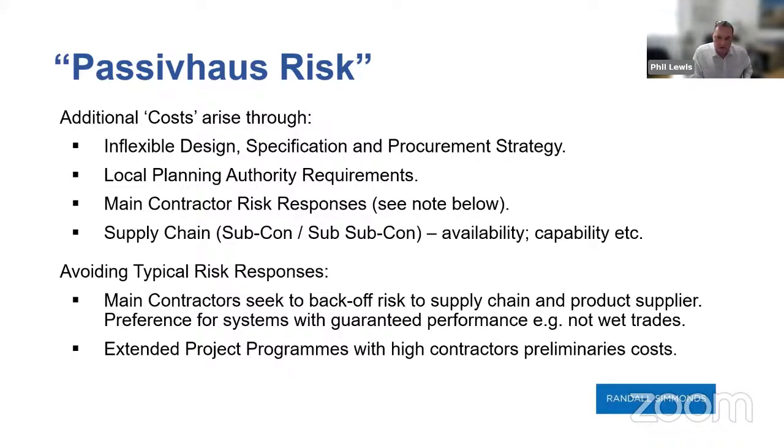Okay, and remembering on this slide that it's not just main contractors, it's a whole supply chain. And if you're building a large project, you would pay to invest in actually educating the supply chain that's likely to serve your scheme, because what you're actually adding with risk is subcontractor risk, and then your supply chain partner will add risk to that, then your main contractor will add risk to that, and it increases. So if you're doing a large scale scheme, you need to control those risk additions. Okay.